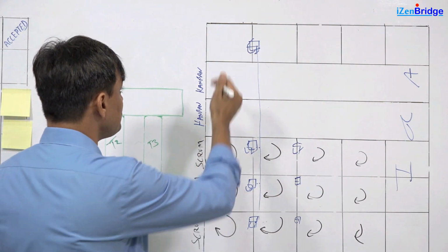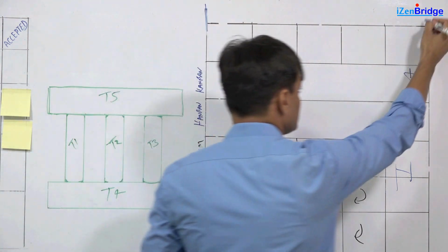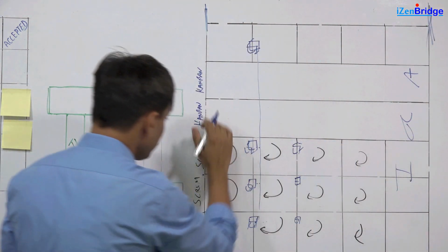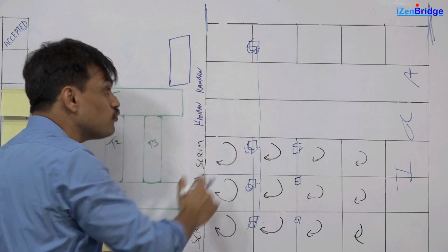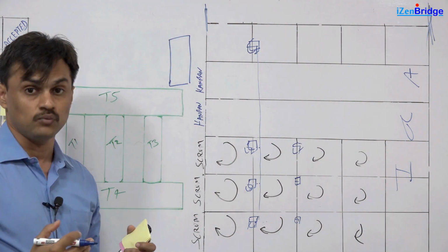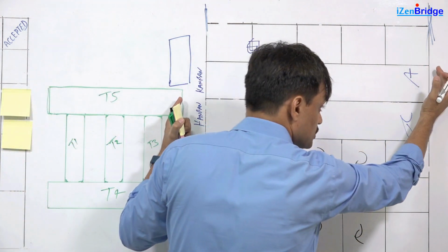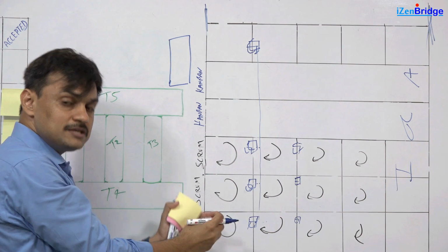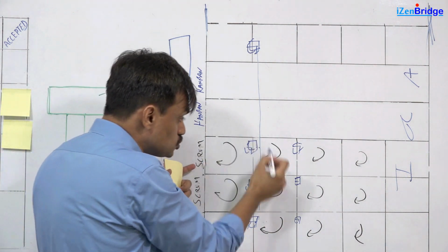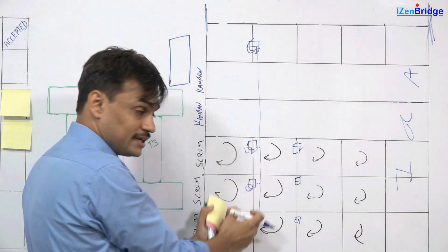So, typically the PI boundary is 10 weeks. So, all Scrum and Kanban teams participate in a PI planning meeting, and they forecast and commit their work for these 10-week boundaries. The difference is, the Scrum teams will divide those commitments, those team backlogs, into 2 weeks sprints, and they will give a demo at the end of 2 weeks.